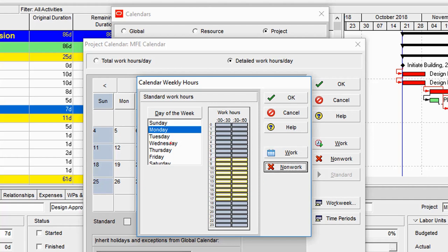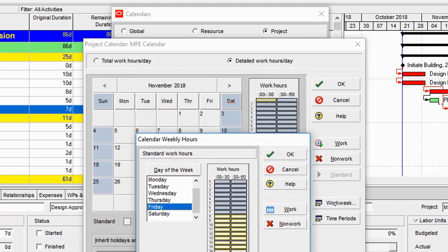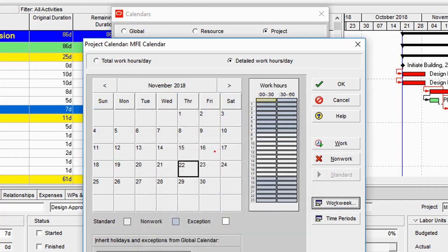So I can also do that by selecting all the days that I have there. That's from Tuesday to Saturday, and then I select 8 a.m., which is when work starts, hold down my shift button, select the second side of 17, and then I click on work. So what I've simply done, you'll notice, is for each of these days work starts 8 a.m. and then ends 6 p.m., and then we work 7 days a week. So if I click on OK, you will notice that the grid for Saturday and Sunday will disappear, meaning this is a 7-day work week calendar.